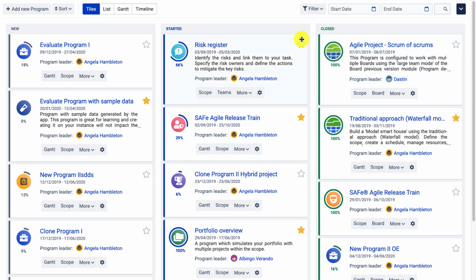There are some basic tools here, but before I explain that, let's go over the basic program data. You have the program name, and the start and end dates. Right now, those dates do not impact any Jira start and end dates, any Jira issues, or any schedules within the program. Right now, they're totally independent. This was different in the past when those actually did impact the Agile schedule. Right now, this is no longer the case. It will be redesigned, however, once we release the new module.